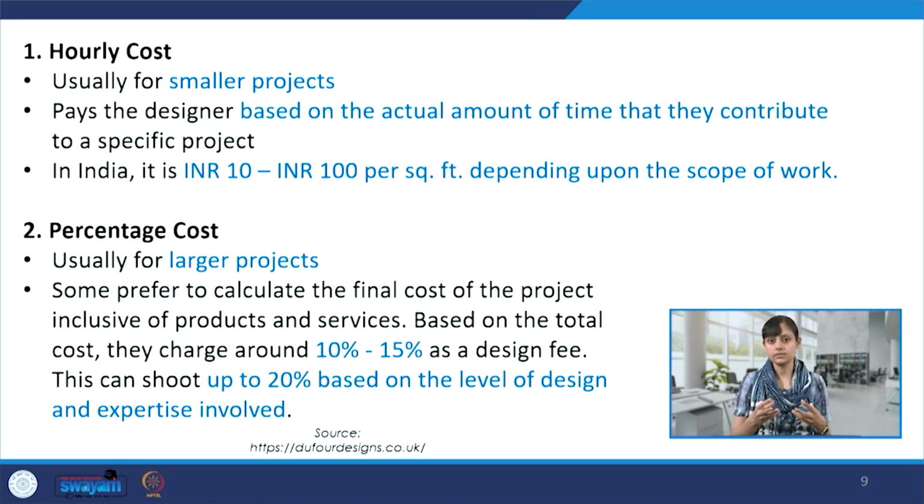And if the designer is really bringing customized designs, keeping in mind the context of Uttarakhand, employing local materials like ringal, which is a species of bamboo, or doing something very innate to the identity of the place and bringing local makers into the ecosystem, then based on that customization, identity creation, and the comprehensive details the designer wishes to bring into the project, the fee could be as high as 15% or even 20%. So a little negotiation sometimes also plays a role in getting the total fees.